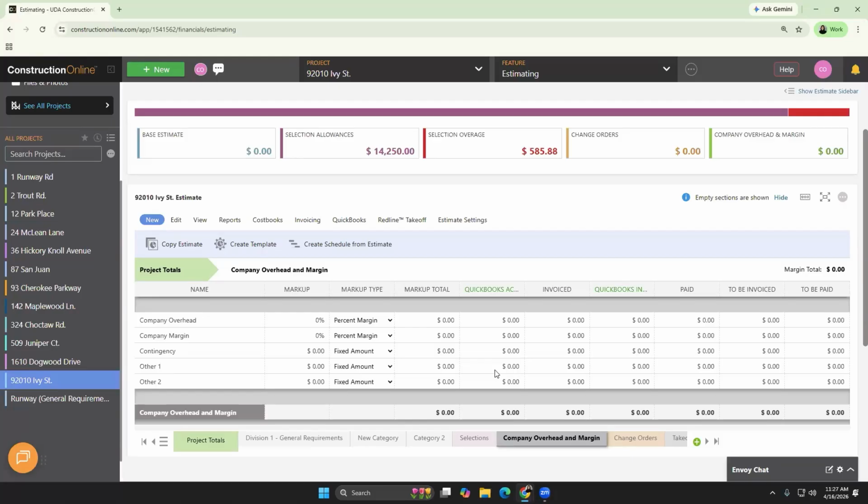I love that, Carly. That's great advice. Yeah. So when we're thinking about this, each component is calculated one of three ways. So you have your percent of cost, that's going to kind of be your most upfront. Percent of cost calculates the component as a percentage of your estimate total. So whatever your estimate subtotal is, it's going to take a percentage of that. That's your percent of cost.